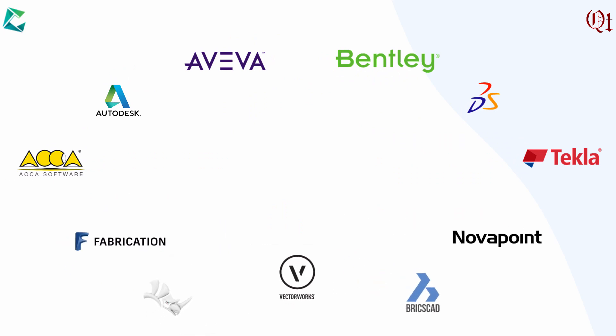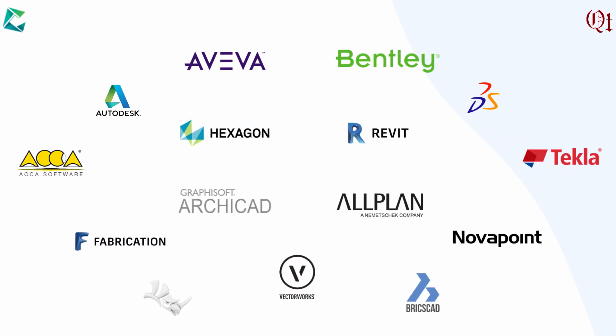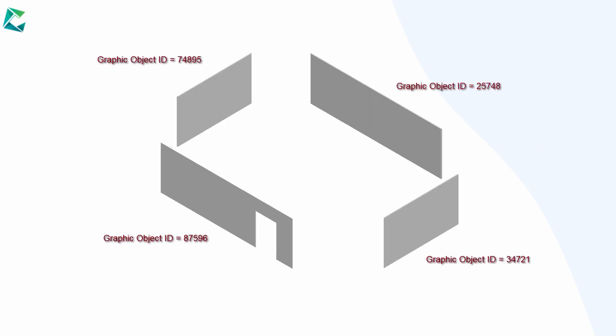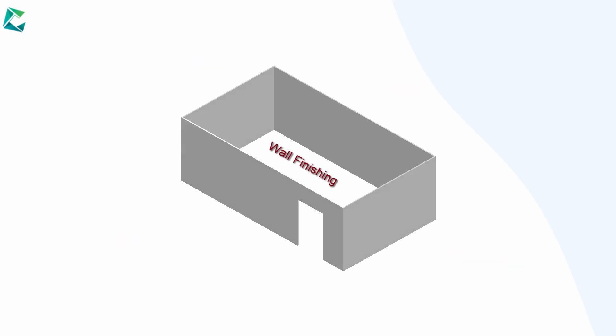3D modelers create 3D objects based on modeling convenience and with available tools in the software that are good for design verification, clash detection, and visualization. To give an example, wall finishing may be modeled as four 3D graphic elements, each finishing being one 3D graphic element. But for construction, these four graphic elements represent one construction object, which is the wall finishing of a room, regardless of how many 3D graphic elements are used. This is where tagging raises BIM models to construction scope.